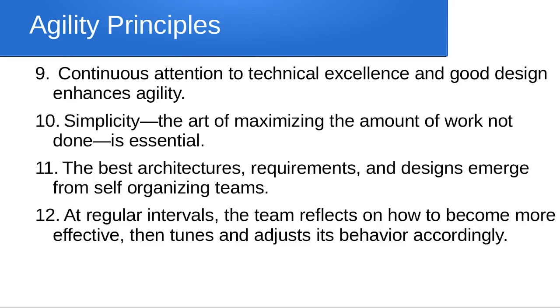They try to figure out what difficulties we are facing, what we have achieved till now, whether we were able to complete the features or not, what each team member has completed, and accordingly we adjust our plan and plan for the next 15 days. This is something in our agile process.